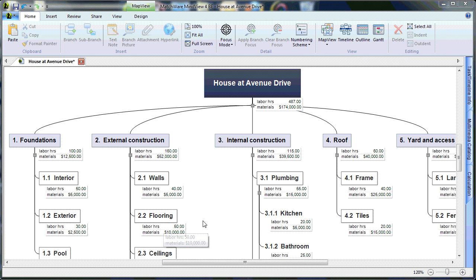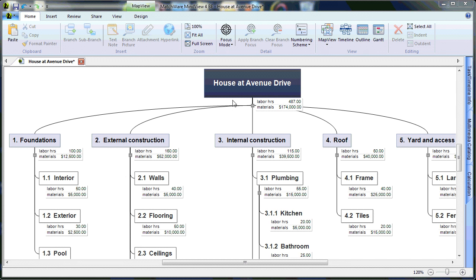To speed up this tutorial, I've entered all the additional remaining Labor Hours and Materials, calculated the running totals on the different phase levels, and rolled them up all the way to the main stage level, showing 487 Labor Hours and $174,000 in Materials.